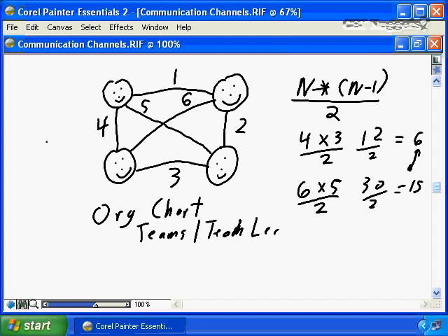By having teams in place, each team member will be communicating within their team, but probably with very little communications across teams, and the communications across teams would be done by the team leaders. So instead of having one very large communications process, you would have a number of smaller communications processes within each team and then between the team leaders.